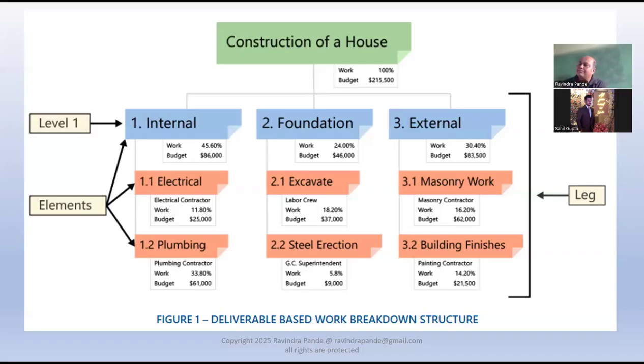But if we saw that while we are doing foundation, then we have to install a draining pipe and that stuff before doing foundation, right? Again, there could be some overlap also. Both can be included, or some of it can be included in foundation and some of it can be in internal also, because there are pipes coming from outside. There might be a big pipe available on your roadside, and you're connecting a small pipe from there to your house underground. And then another pipe from underground to your first floor, second floor. And again, depending upon how many floors you are building, first of all, they have to make a connection with the main point.